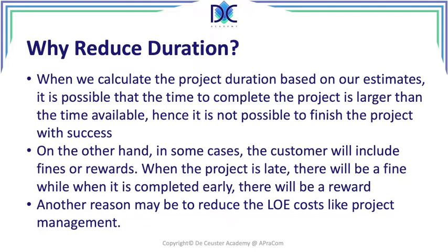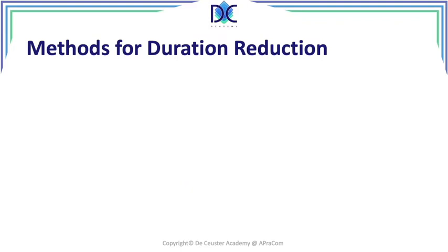We start at the beginning of the project, we finish at the end of the project. When we reduce the duration of the project, management costs, expenses will also be less. So there are different ways to look at this. Reducing the duration can be interesting because we can save money, but it can also be necessary to avoid fines or to take advantage of some rewards and bonuses.